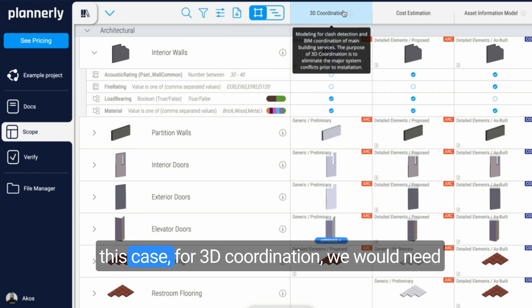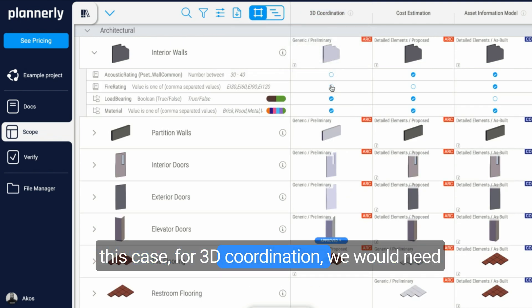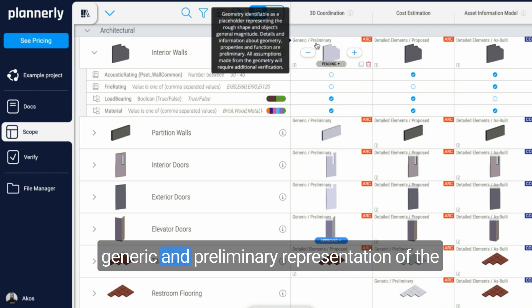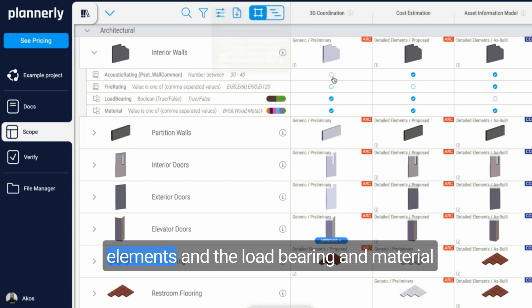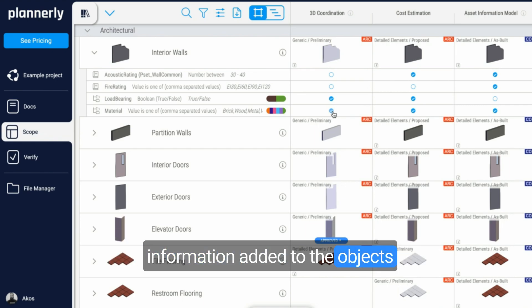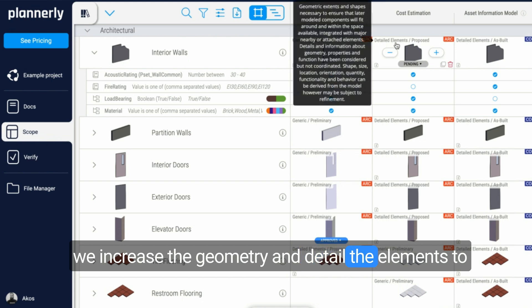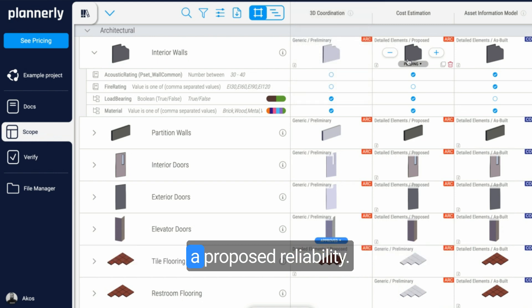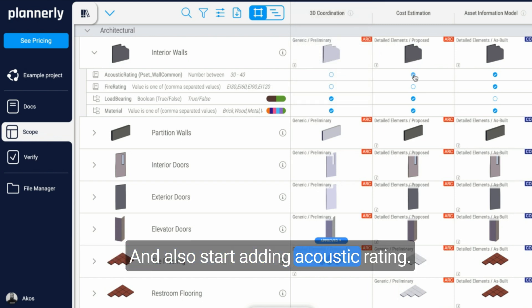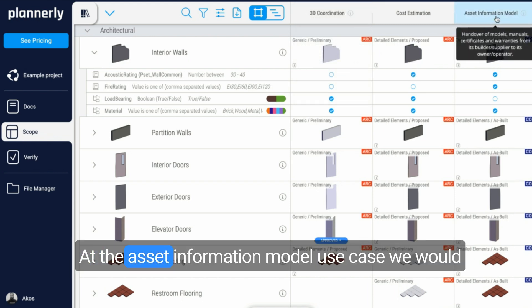The way to read this matrix is, for example, in this case, for 3D coordination we would need generic and preliminary representation of the elements and the load bearing and material information added to the object. For cost estimation, we increase the geometry and detail the elements to a proposed reliability and also start adding acoustic rating.